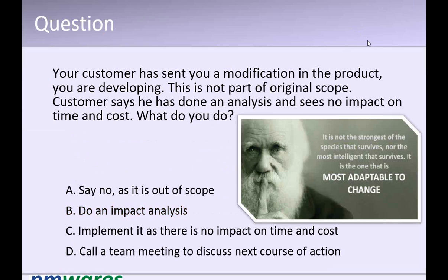But if the vendor accepts so and implements it, there is a fair chance that problems come. A one-liner will not be a one-liner, it will actually be 10 liners. But it will happen when you start working on it. And then the customer will not be able to meet his objective because he wants to get it faster. Therefore, even if you accept his impact analysis, your customer will still not be happy. More than 90% chances he will not be happy because he will not get the end result.